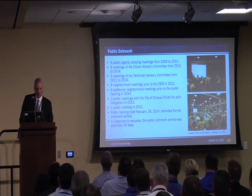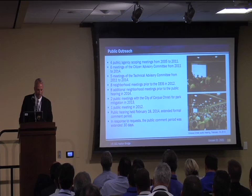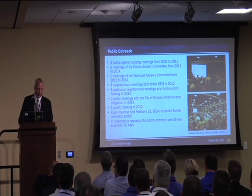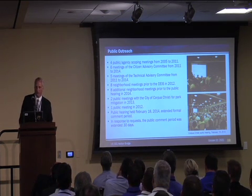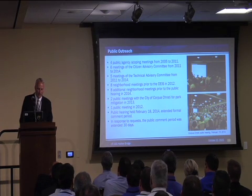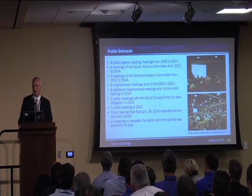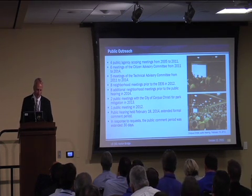Then again, between the public meeting for the draft EIS and the public hearing in 2014, they held another 8. They held 2 public meetings with the city of Corpus Christi just for park mitigation. Then we had the public meeting in 2012, followed by the public hearing in February of 2014. And to get some extra comment, they extended the period an extra 30 days just to have more time to get public input on the project.